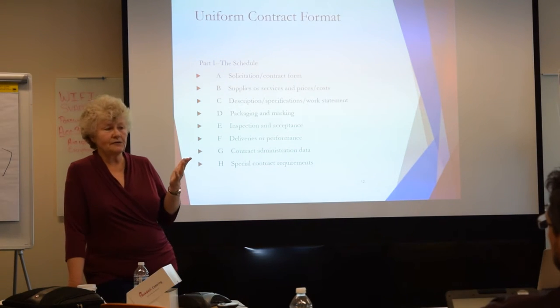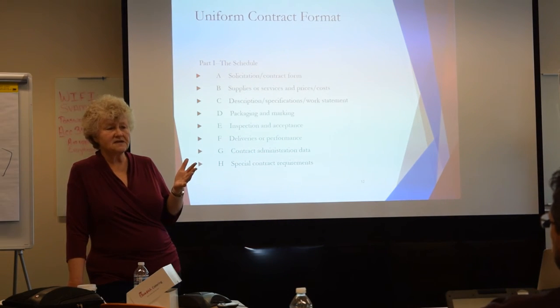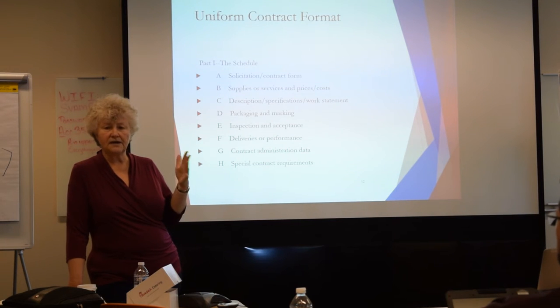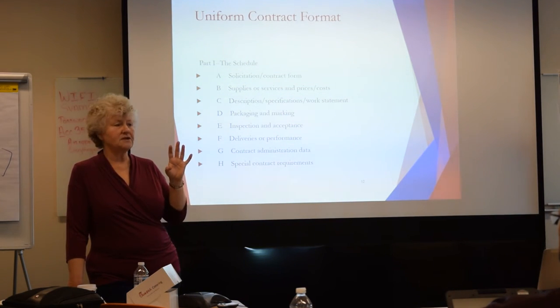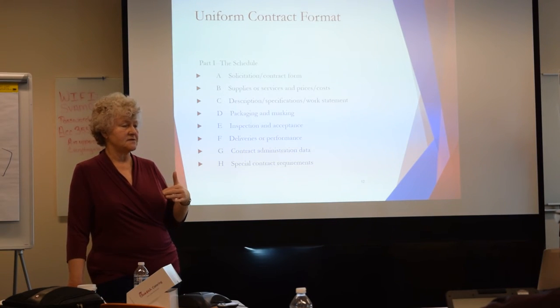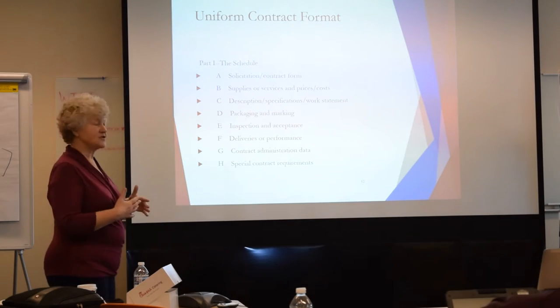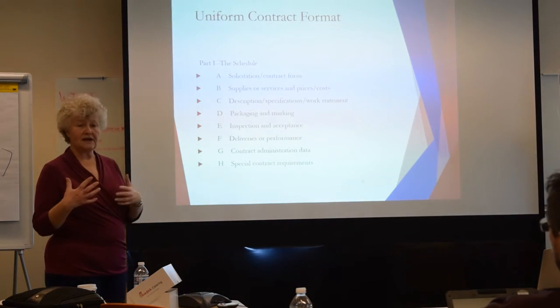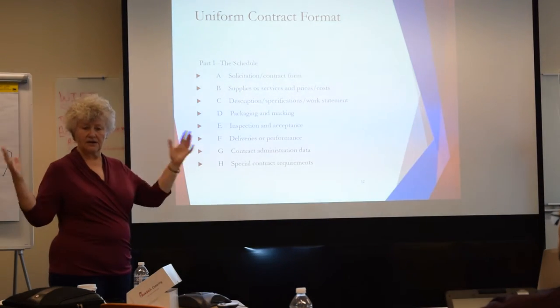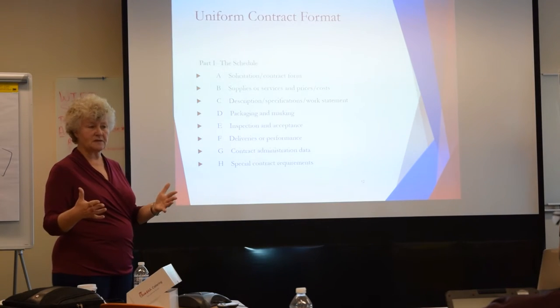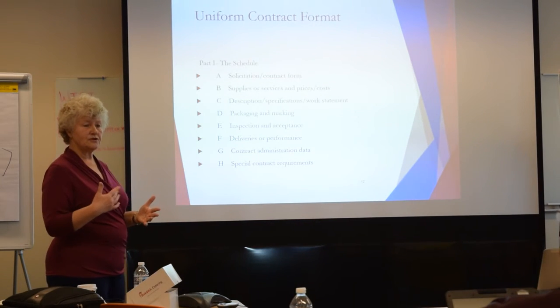And the reason why they were being so specific was because they were going to airdrop these things behind enemy lines. And so they had to be hardened. And they wanted to make sure that you could accommodate that. So packaging and marking can even have requirements that you have to pay attention to in the proposal. Because if you're having to harden something, hardening the shipping container, that's going to be more expensive. So you want to make sure you know what those costs are.